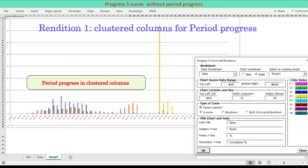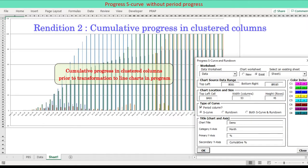Period data are displayed in the clustered column chart form. Cumulative data are displayed in the clustered column chart form, superimposed on the period data columns.